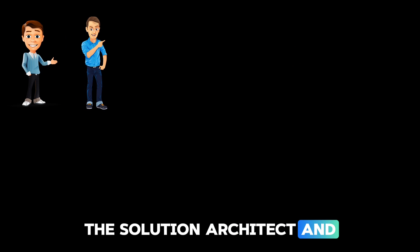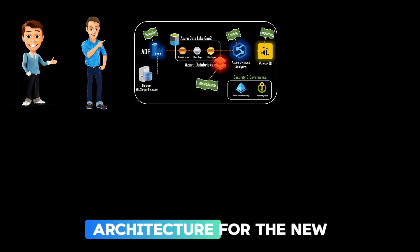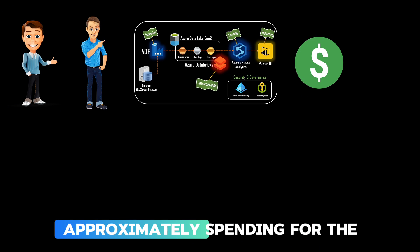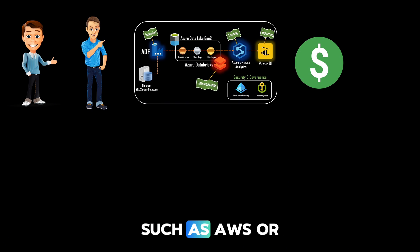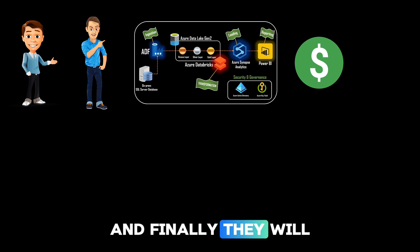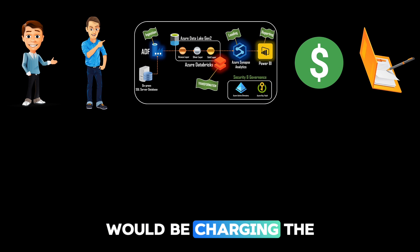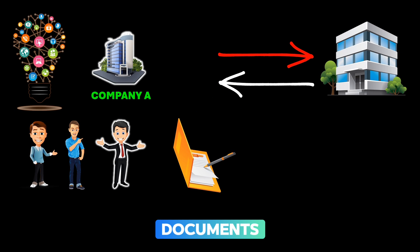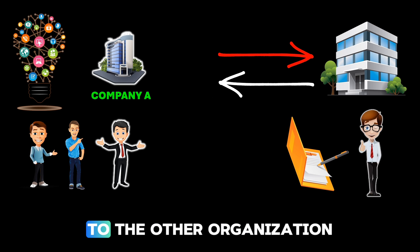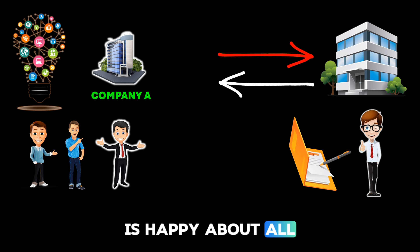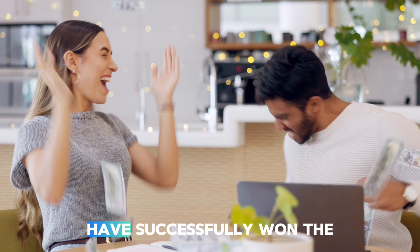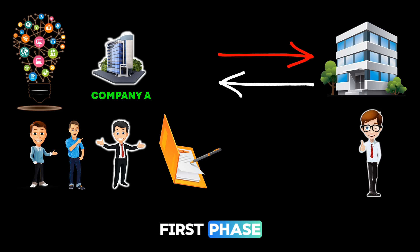In this final stage, the solution architect and the data engineer work together on creating a modern data platform architecture for the new solution. They also work on the platform cost — estimating how much the organization would approximately spend on the platform every month to cloud providers such as AWS, Azure, or GCP. Finally, they work on the costing documents — the total cost Company A would charge the organization to build the platform, with time frames. Once done, all required sales documents and contracts are signed by Company A and sent to the other organization. When the organization is happy with the submitted details, they countersign the contract, meaning Company A has successfully won the contract — marking the end of the pre-implementation phase.